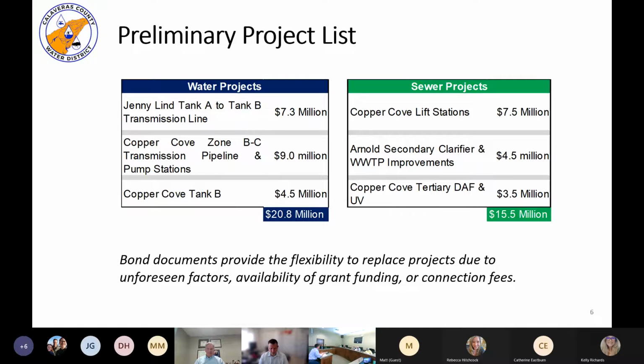It's about 100,000 cubic yards of material that we need to break down. You mentioned this in the past, so we did go back and ask the consultant to look at it. They estimated about 20,000 cubic yards can be taken from inside the interior of the dam.